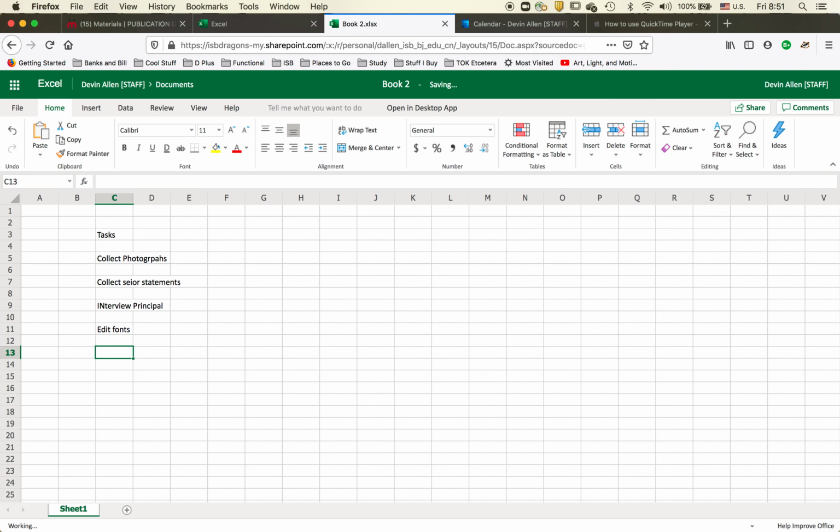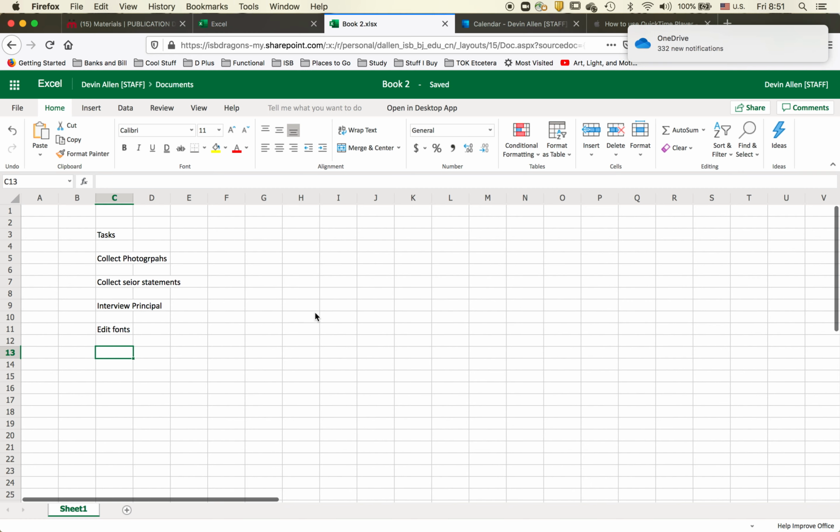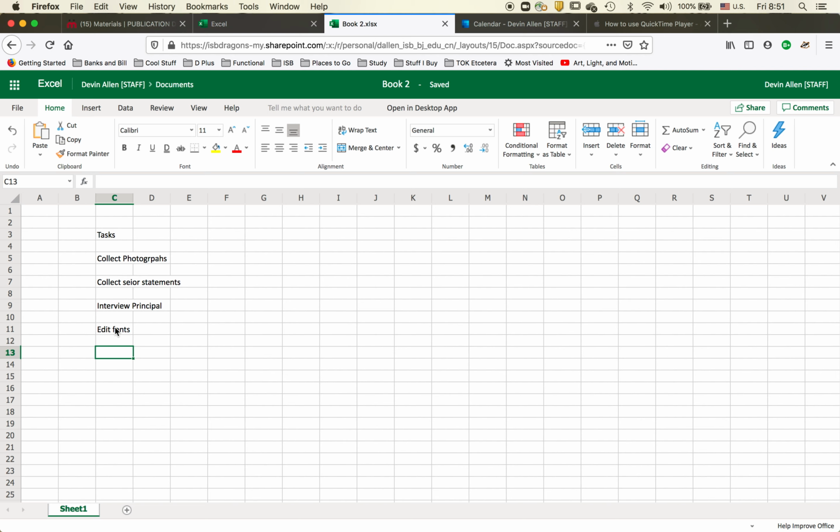Now, it's important that you think about the order first to last before you write them down. All right? Because with a Gantt chart, you want it to be lined up horizontally so that it collates with the vertical here. So you want things that are near the top to be also closer to the left-hand side, and things that are near the bottom closer to the right-hand side. All right, so do that thinking first. I mixed up everything on that list, so don't just copy it the way I wrote it. All right, decide which way you want it to go.